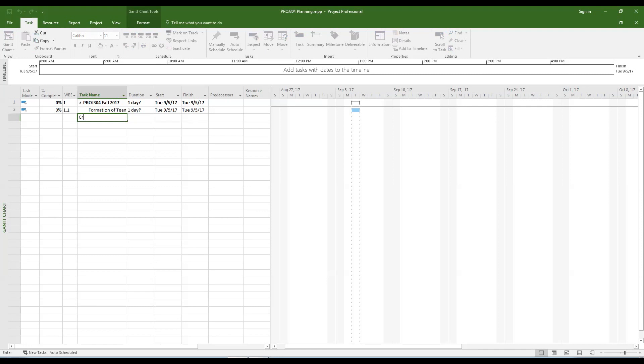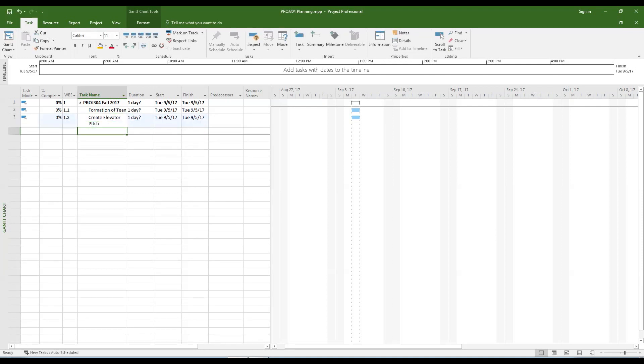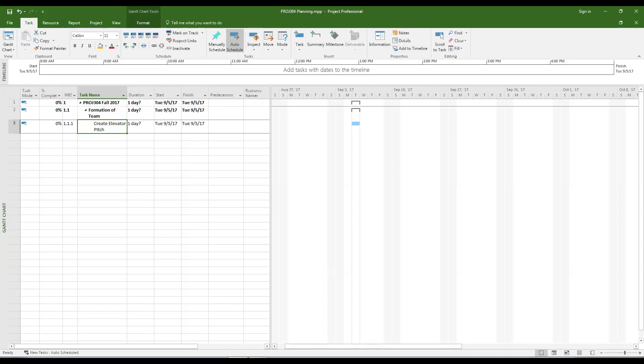Enter the name of the next subtask. Remember that task names should be formatted as an action followed by the noun. Continue entering the task names and think about what level of subtask they should be. You should not go beyond four or five levels of depth.